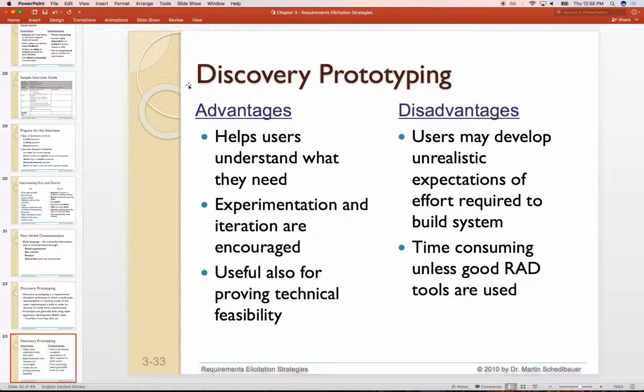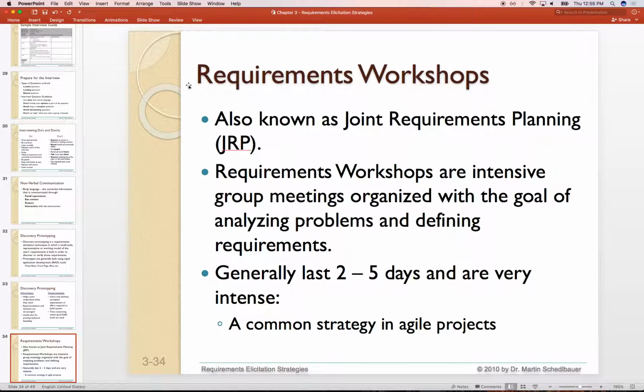So these prototypes can also be misleading for the business owner, who looks at this as, oh, you're done. Why do I need to wait? Why is it going to take months? Why is it going to take years? You're done. You're showing me something that is sort of working, right? How much harder can it be, right, to actually have a product? So it could be very unrealistic or give false expectations to the manager, right? The upper management who don't have an idea of how hard it is to actually develop software, right? So you've got to be careful and manage those kinds of expectations.